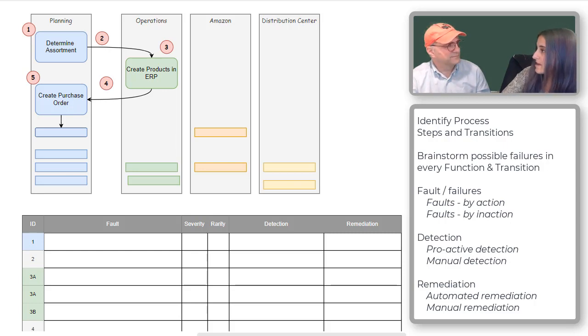It's actually checking a document from the product development team, which has all of the prints that are approved and ready to go. But if your customer is a little bit different, then you have to start this process over. So the remediation, if you pick the wrong print, is either to drop it, or try and get it added to the list for future development for the next season, because you wouldn't make it for this season, because the lead time's too long.